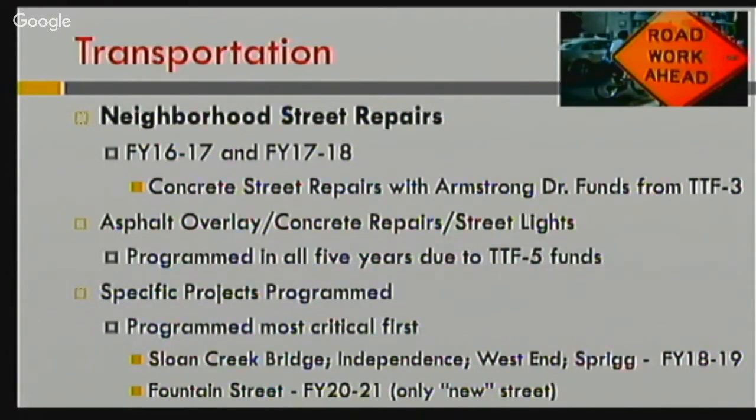And is that cost still accurate? I know we looked at a significant number of blocks in South Cape and that cost was nowhere near what was expected. That's a different deal because those lights are owned by Ameren. So we entered into an agreement with them to up our rent of those lights rather than us paying the upfront cost to replace them. They bear that. I see. And so it's a different methodology.